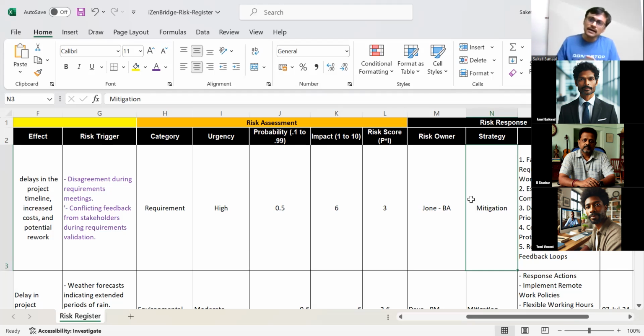Now, can I just assign someone as a risk owner if another person is not ready to own it up? Probably not. As per the individual's roles and responsibilities, and technical capabilities, we understand who is expected to take care of which area. Based on that, I allocate the risk owner, and then I work with that person to make him understand that he's owning this risk. But if he has a reservation, then we need to find some other owner. I can't force people to own the risk.